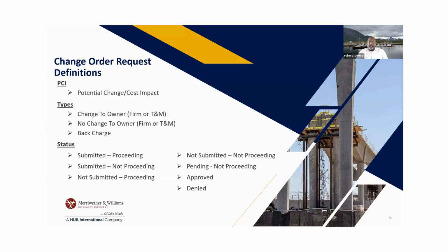They might have a cost manager that's reviewing all these change orders that you're submitting, and they'll look and say, we think it takes 10 man hours to do this, and you're saying 15, 20 man hours. They don't disagree, so you're going to have to justify it and come back with, okay, this is what it really was, with my tickets to show it. Or they might say, hey, this is all we're going to give you. We can't give you 20 hours when it should have been 10 hours to do this.